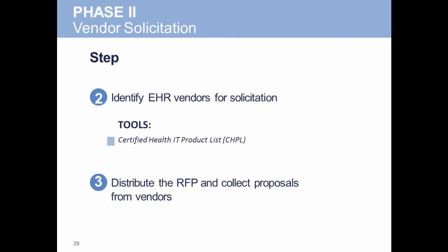Step 2 is to identify EHR vendors for the solicitation. You should select your top vendors by developing a screening process using a set of your minimum criteria, such as the type of software solution. Is it cloud-based or locally hosted? Integration with other systems, for example, an administrative or other clinical system. The documentation capture processes.